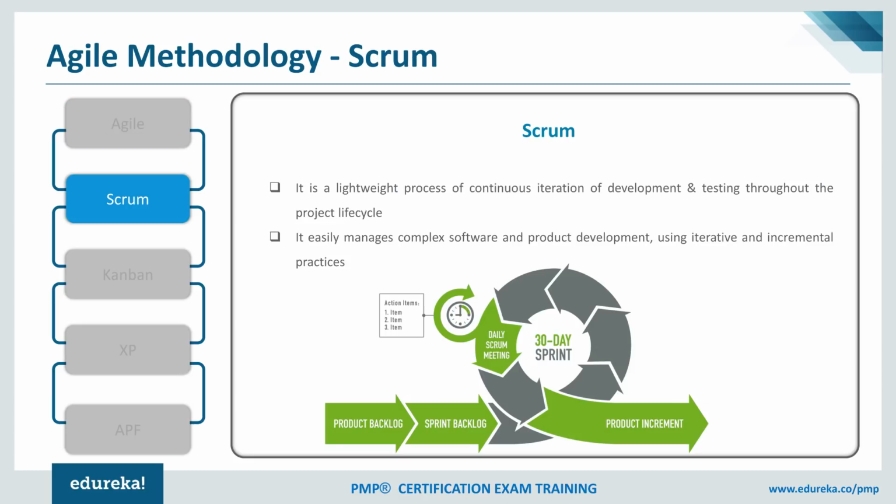Now Scrum is one of the methodologies within Agile. Scrum is a very, very lightweight framework which helps us in defining the sprints. A sprint is nothing but an iteration in Scrum. So an iteration in Scrum could be anywhere between 1 to 4 weeks. And Scrum has defined certain lightweight ceremonies or events that we do, right from sprint planning to meeting on a daily basis as a part of the daily stand-ups. Then we have sprint demos where we show the customer what we have built and we take continuous feedback during the demos, and then we end the sprint by doing the retrospective. So this is what typically happens in that small container of a sprint, which is just 1 to 4 weeks maximum duration.